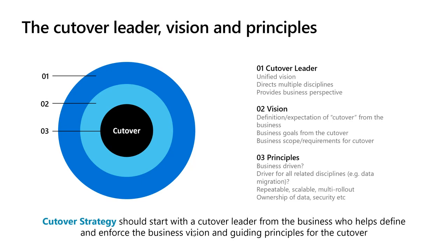The second thing we'd recommend is to think about having a vision for the cutover as part of the initial cutover strategy. And this is in the initiate phase, right? This is right at the beginning of the project. So you're defining what is it from a business perspective you're expecting to get out of the cutover, right? And not just the transition, but in a bit more detail, right? Are you going to be expecting the old system to get decommissioned, or is that a separate project? Are you expecting to be able to use the data from the legacy system to compare with the new system? Are you going to want to do year-on-year comparisons? What is it that you're expecting, right?